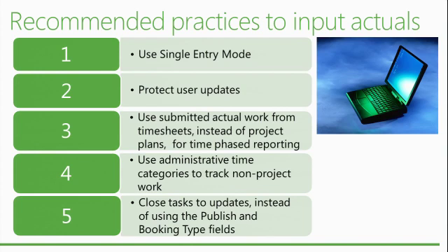Another is to use admin time categories to track non-project work, as opposed to using a regular project to track non-project time. And the last one is to close tasks to updates, to lock them down, instead of using the publish and booking type fields.